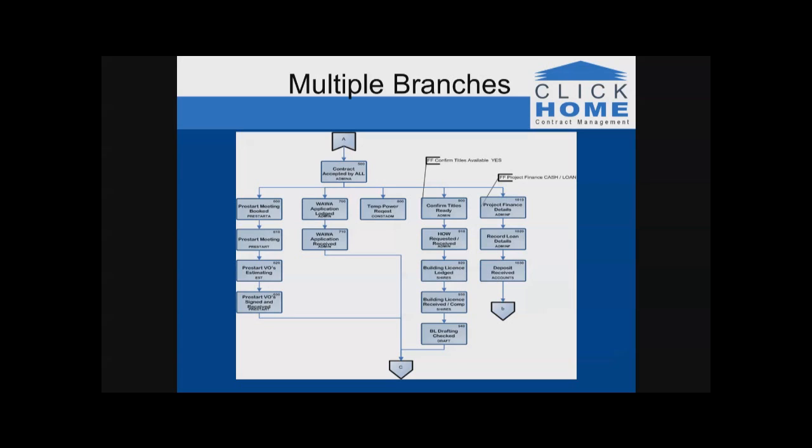You can easily coordinate multiple things happening on the same job at the same time, much reducing the time frame it takes to get from the beginning of your pre-construction workload to the end, and not bringing about a massive management headache. So you can see that we go down this first line, you've got 4 tasks, and then it brings it all together. That's the notion: complete these 3 lines of tasks, and then you proceed all at once together.